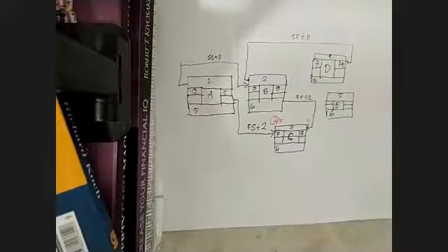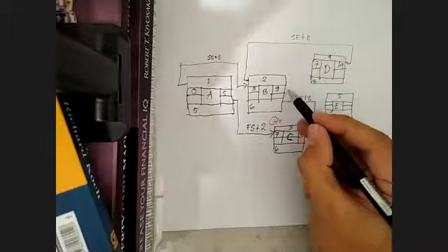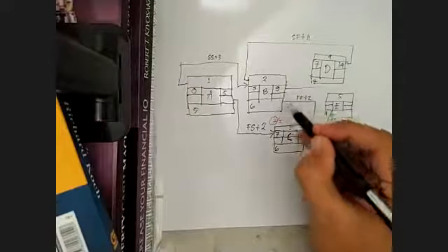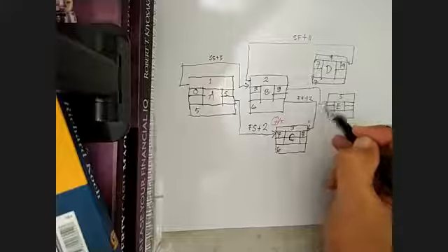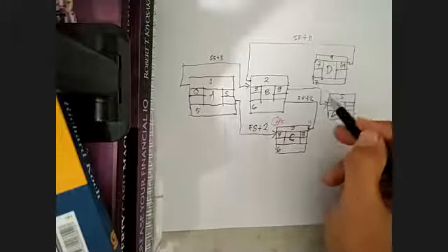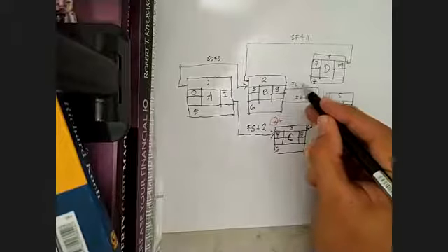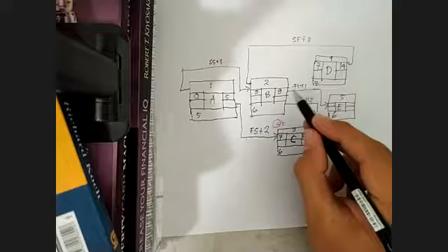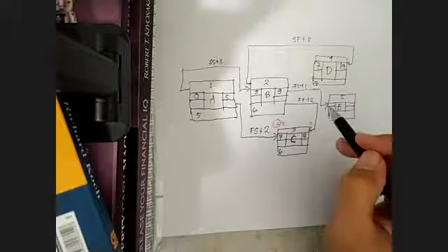Take a look at the equation. The first predecessor is FS from activity 2 to activity 5. Finish to start means that I will start the arrow from the finish, or the right side, of number 2 and come into activity 5 on the left side. And I will write down FS plus 1. Okay, FS plus 1. That's it. We cannot directly calculate since we still have another arrow.